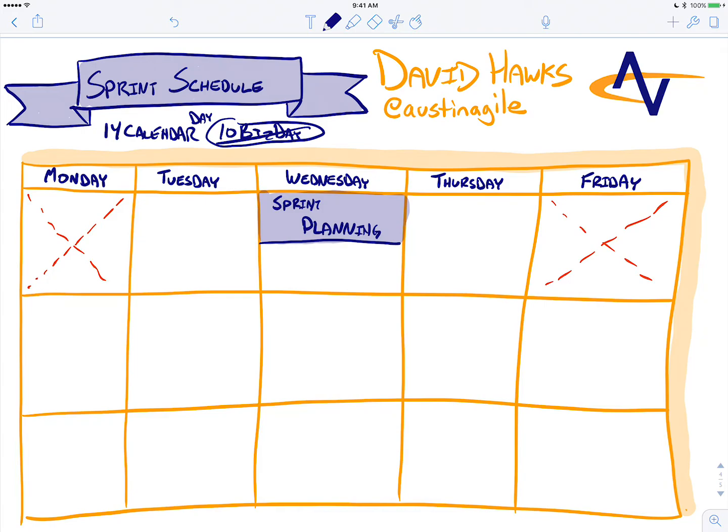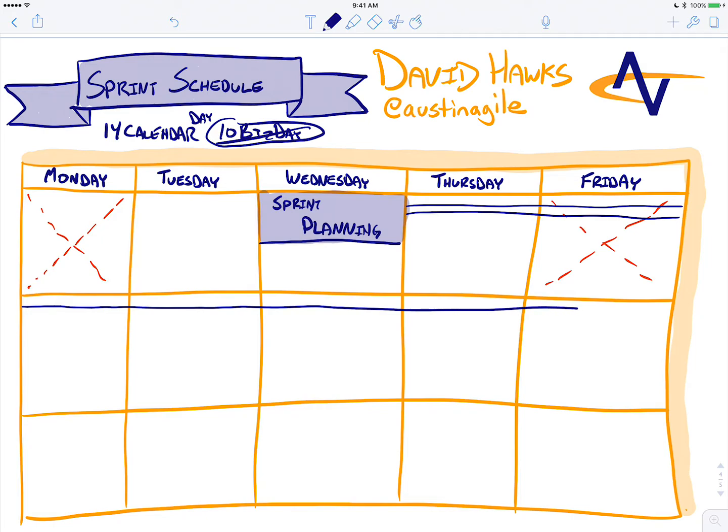So what happens on Thursday? Well, most teams choose to do their daily Scrum in the morning. Now, it doesn't matter if you do the daily Scrum in the morning or the afternoon or right before lunch or right after lunch, as long as it is consistent throughout your sprint and it's at the same time. Again, we like rhythms, so if it's a dependable rhythm that every day at 9:30 we're going to do a